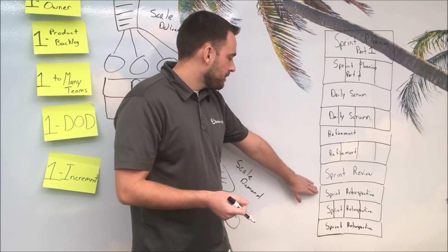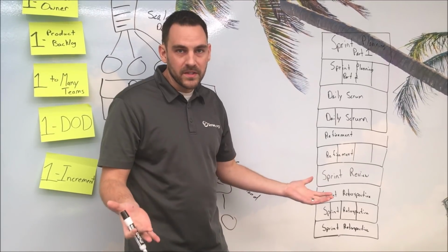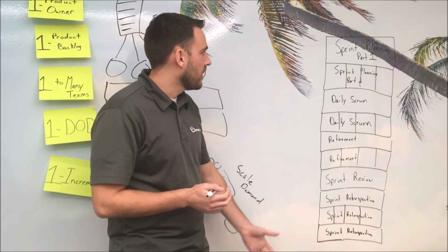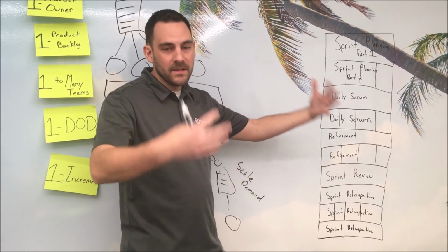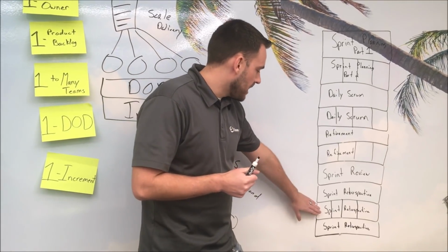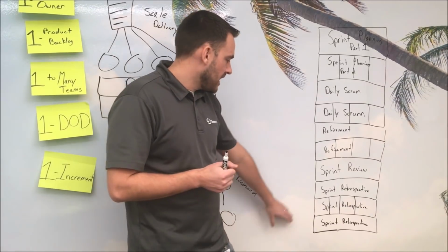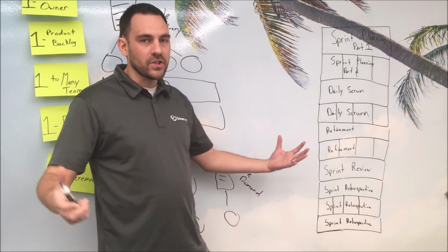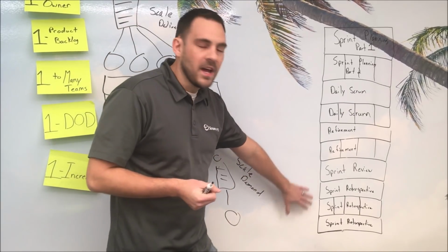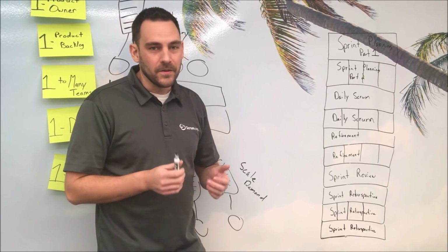Then after the sprint review, you have a retrospective with delegates from all the teams, thinking about those larger, bigger things that apply to all the teams within this product. Then you have individual sprint retrospectives, where you're talking about things that are more team-based. And then a final larger retrospective with delegates, again, to make sure that all the things that were addressed in the first one got taken care of, and that we have action items of how we're going to continuously improve in the future.